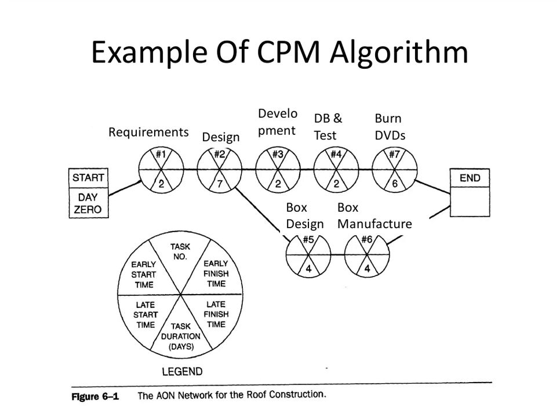Why? Because if there's one of these tasks that depends on us, that has to start by a certain time to finish the project on time, we need to get our house in order so that we can finish ourselves by that minimum time. We've got to finish up by that, whatever the earliest time is that one of those things is depending on to finish the whole project on time. So this is the minimum coming back the other way.